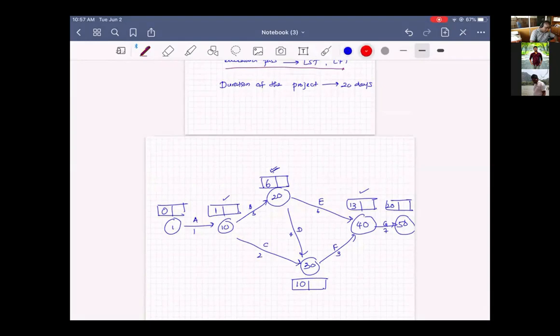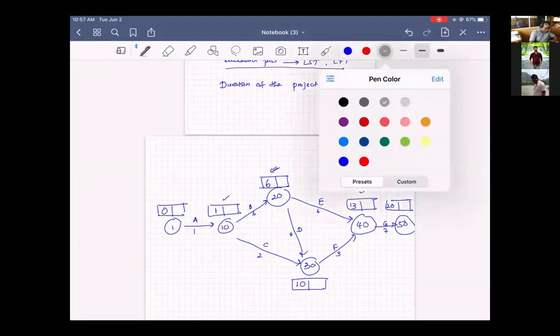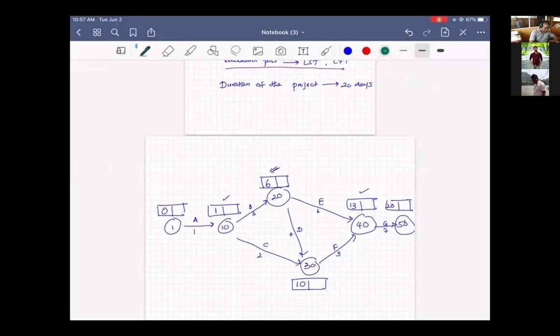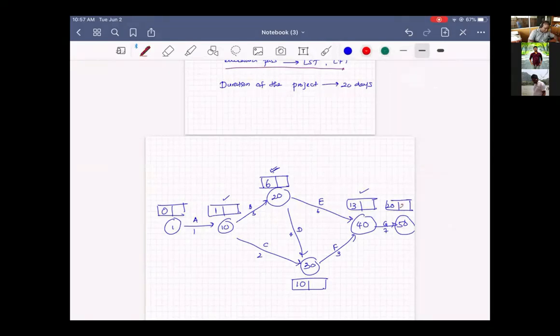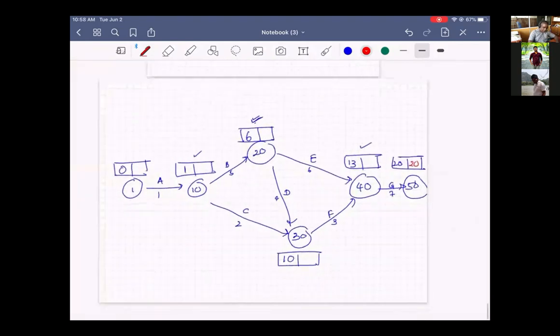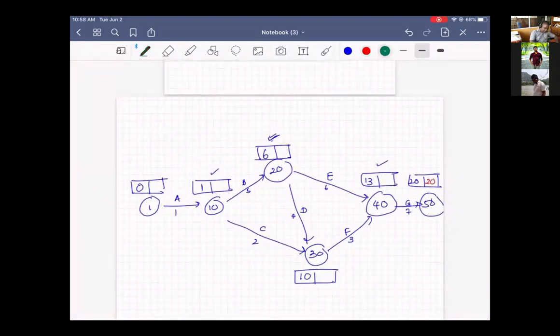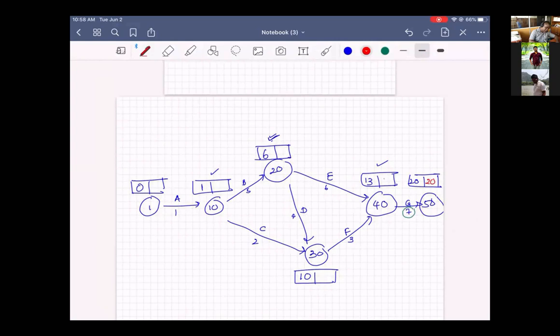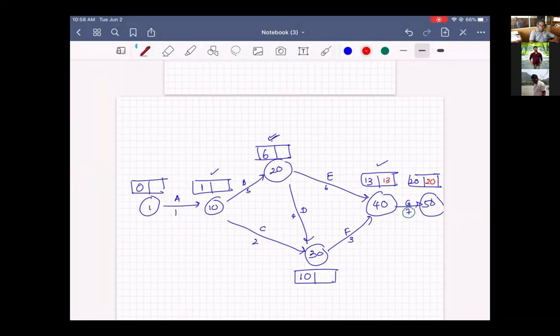Right. So I'm going with the backward pass. So we are starting with this 20 here because we are calculating from back. From the day that we finish. You can use the chat if you want, if you have an issue. Right? No issues. Then this is the finishing date 20 minus 7 is 13. No issue on that.